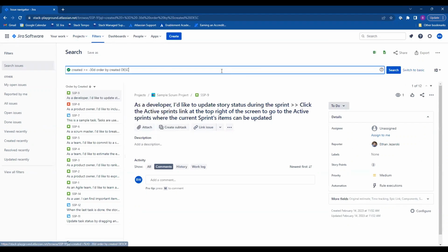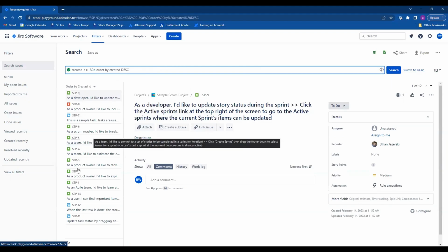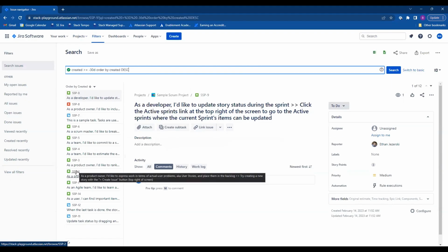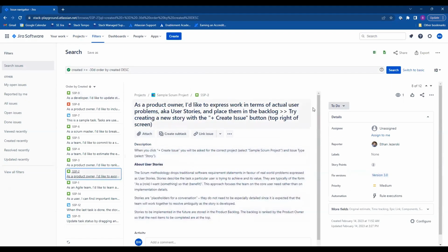Now review the issue list. If you only want certain tickets, add more filters, such as status, assignee, issue type, sprint, or date range. Once the list shows the issues you want, look for the Export button. This is usually near the top right of the issue search page.